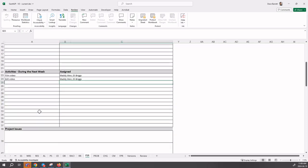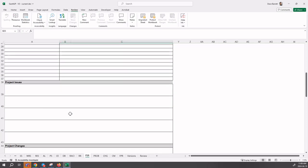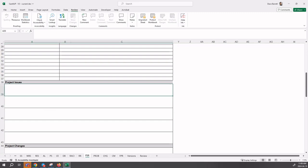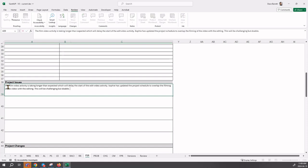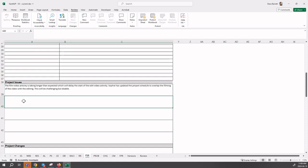We now have to enter the issues that are currently in our project, particularly in cases where you're in a yellow or red status. There needs to be issues to find, because otherwise why are you yellow or red? A green project can have issues as well, just not big enough to cause it to go yellow or red. Our first issue, which I'll just type in, has to do with the film video activity taking longer than expected, describing it as well as the solution that we defined.